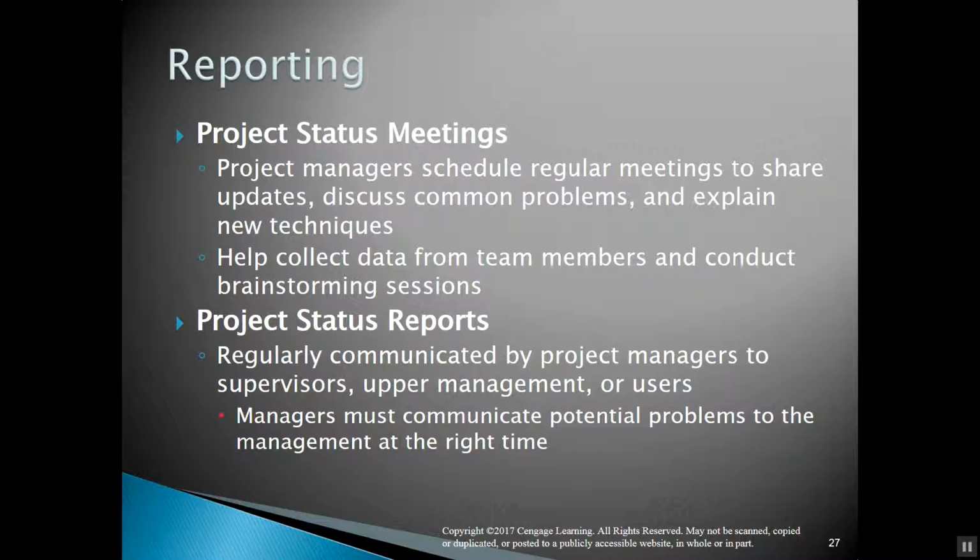Now, it's not always an option to, well, just come back tomorrow. We'll just come back day after tomorrow. Because the companies that we're dealing with, those external entities that we talked about before, they have their own schedules. That crew was scheduled to be on your job today, 3 other jobs tomorrow, 2 jobs the next day. So it's not like, oh, we'll be back tomorrow. We can't assume they'll be back tomorrow. Things have to be rescheduled.